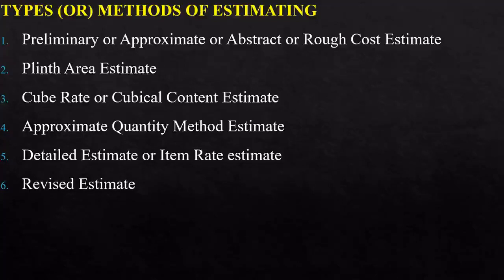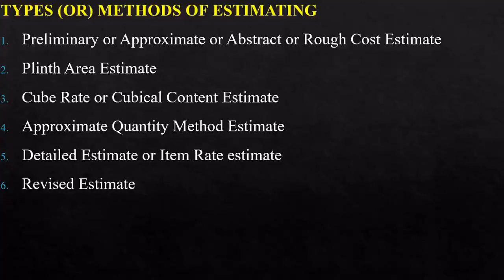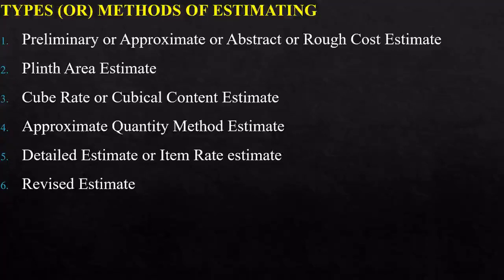The sixth type is a revised estimate, which is also a detailed estimate. A revised estimate is required when the original sanctioned estimate is exceeded or likely to exceed by more than 5%, or when the expenditure exceeds the administratively sanctioned amount by more than 10%, or when there are any material deviations from the materials for which sanction was originally obtained.